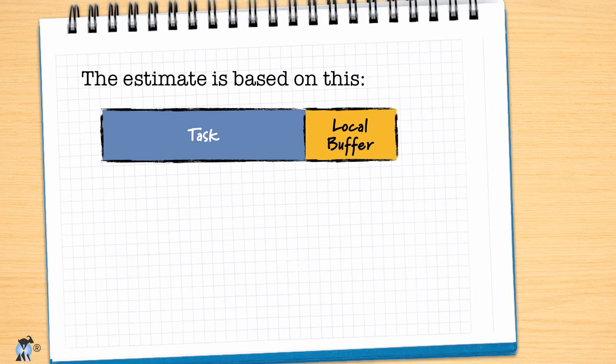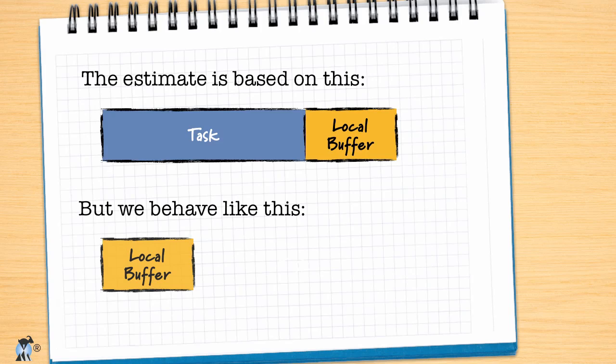Suppose that a month later it's now time for me to work on that task. I look at it and think 10 days, no way, that shouldn't take more than seven. And I let the first three days go by before I start. I use up that local buffer right at the start.